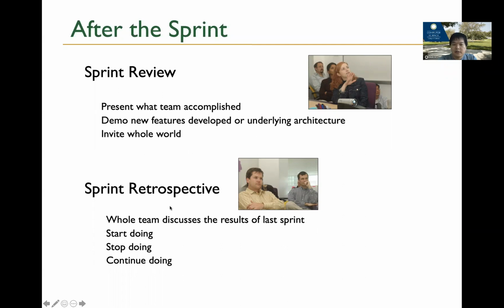There's also a component, sometimes part of the sprint review meeting, sometimes a separate meeting, to really reflect on the sprint itself: in terms of practice, not technical features, is there anything we should adjust? For example, maybe we change the Scrum meeting time from afternoon to morning, and people find it more efficient. Or maybe we change some tools to sync up the status, which turned out to be more efficient. A lot of this happens at the end of the sprint as a kind of review.